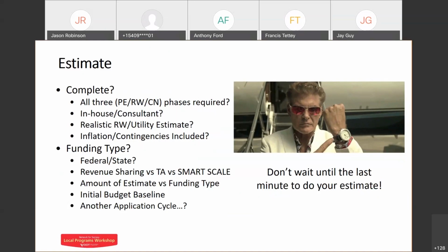All right, so we have a good mix of 5, 10, 15%, mostly in the 10% range. Actually, at 100% plans at advertisement, you still need to include a 5% contingency. And even at award, when you go through your award submission, you would take 5% of the bid amount, the apparent low bidder, and actually include that into the funding amount for the award.